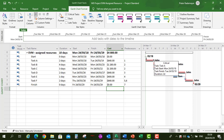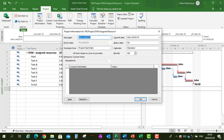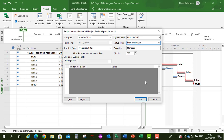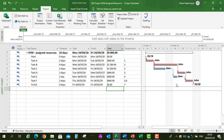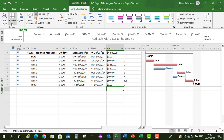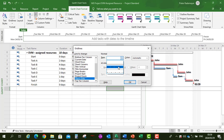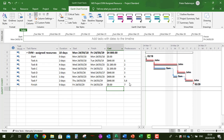Now let's select the status date. The status date is after 6 days, so go to Project, Project Information, and set the status date to 25th March. Click OK. By default the status date line isn't visible, so go to Gantt Chart Format, Gridlines, select Gridlines, scroll down to Status Date, and set it to a dotted black line. Click OK. Now we can see the status date — earned value calculations will be done from the start up to this date.